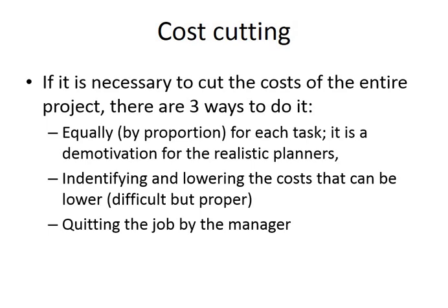Identify the potential possibilities for cutting the costs and cut them there. So which means that you need to be aware of each task that is included in your product. Any kind of mechanical cutting, like 10% per each, may cause a disaster.